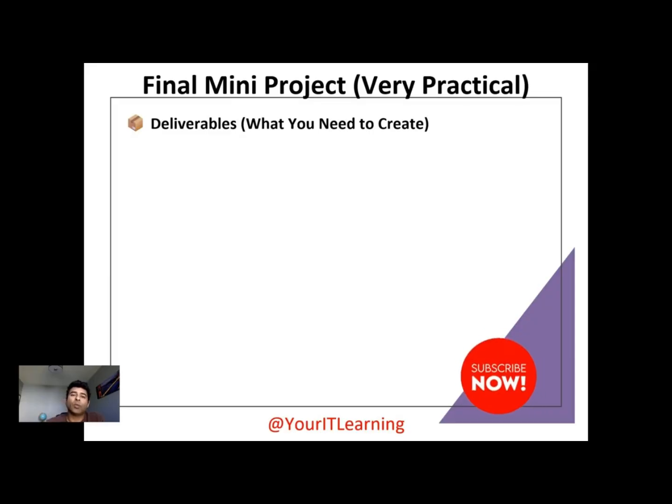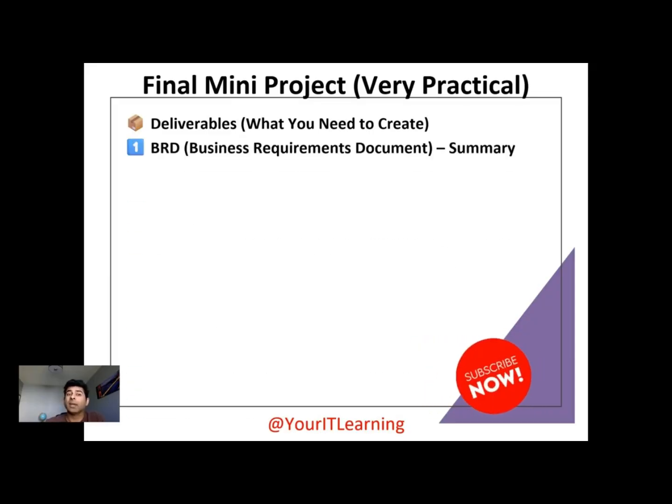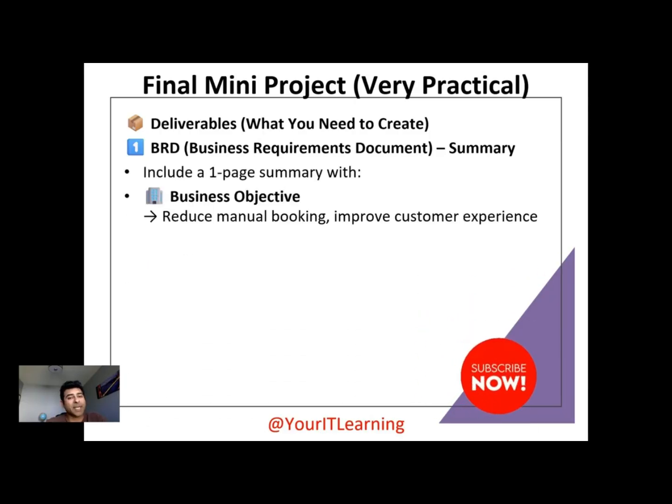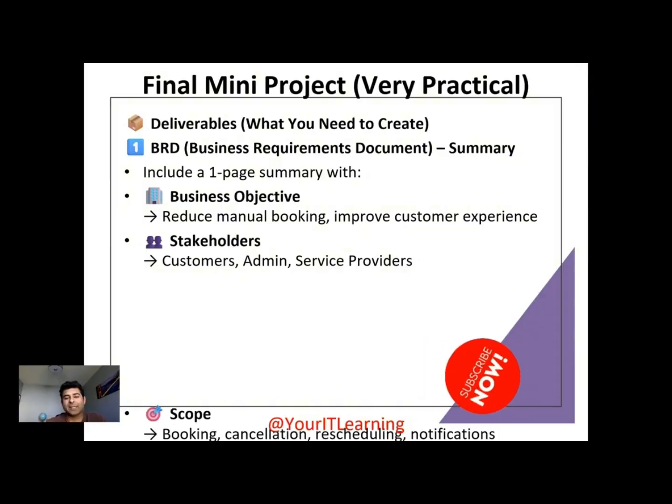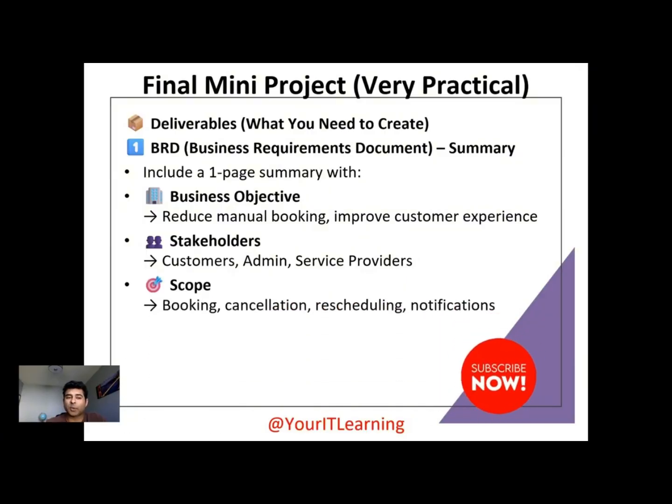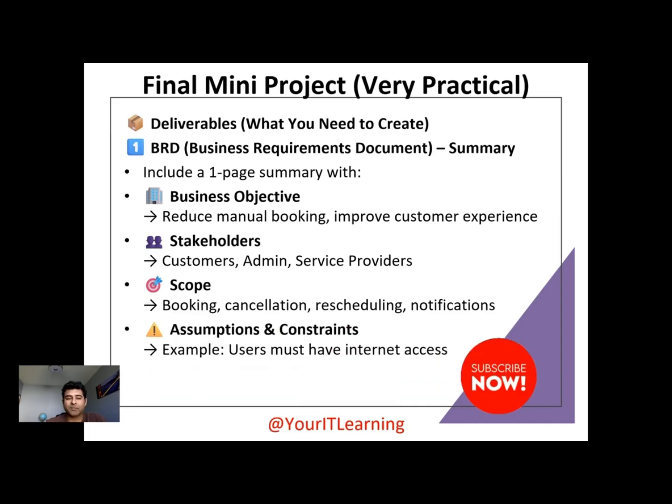Deliverables, what you need to create. BRD, business requirement document summary. Include a one-page summary with business objective: reduce manual booking, improve customer experience. Stakeholders will be customers, admin, service providers. The scope of this project will be booking, cancellation, rescheduling, and notification via SMS or email. Assumptions and constraints, for example: user must have internet access.